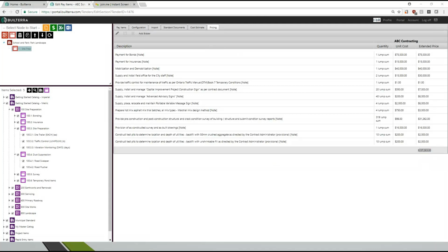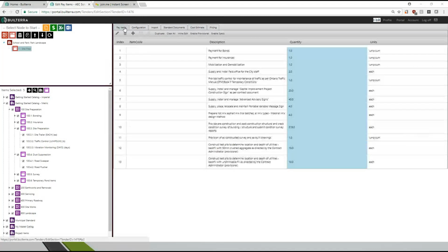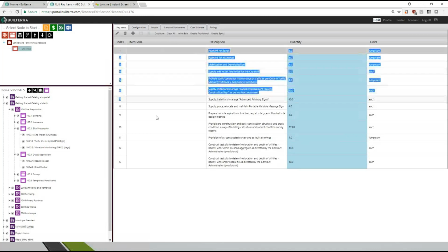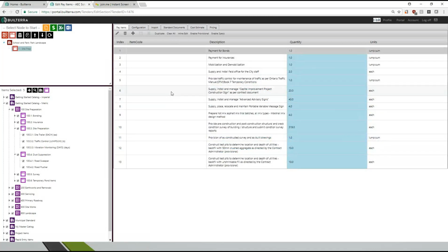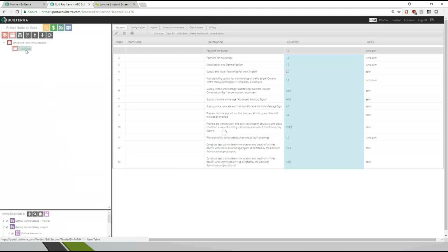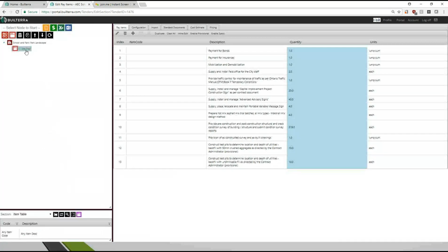All right. So that's very important, by the way. You don't want to be messing with this halfway through the project. So that's good. If you have item codes, put them in, and then you can use them for cost estimating later. So when you create a new table, you can just pick this one, and you can copy it. So there's a duplicate here.